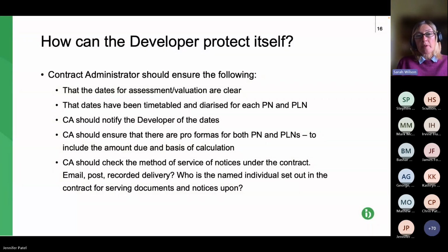So just some tips as to how the developer or contract administrator can protect their position. Basically, make sure all the dates are clear for all of those processes, and bear in mind, typically you're going to be doing this once a month. Make sure they've been diarised. Make sure the developer, the paying party, understands them as well.